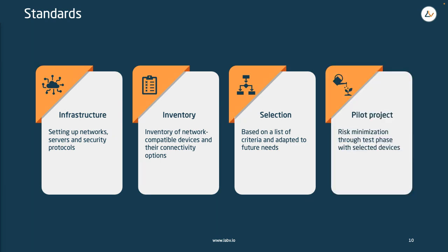And finally, do a pilot project. Why? Because you have to minimize your risks. A pilot helps you to do this, and it also makes you gain practical experience before the entire lab is connected, right? You don't want to start with a full lab right at the beginning. You want to do a step-by-step integration, and that's how you do it. So that's about the lessons learned in the standards.